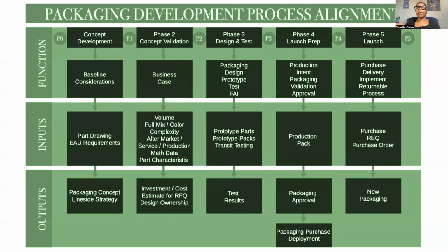Again, going back to that example on the racks, where they're not getting all the racks made at the same time, but they're going to meter the racks in measured amounts and ship them in on a schedule, so that it meets production, but it doesn't flood the plant where they don't have enough room to store it, but then it doesn't short the plant either, so it slows down their production.